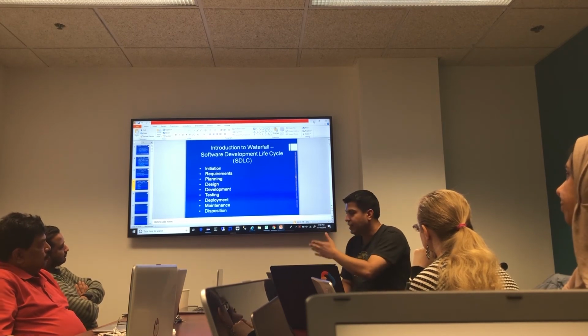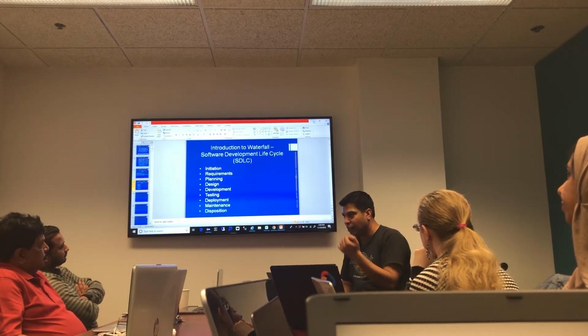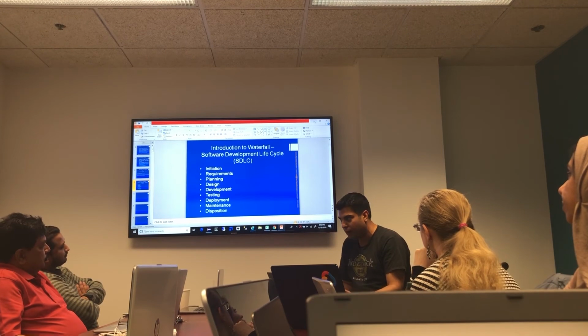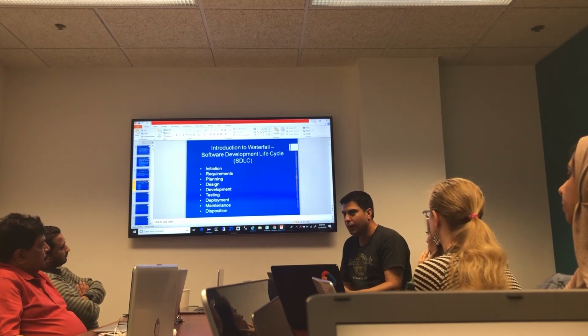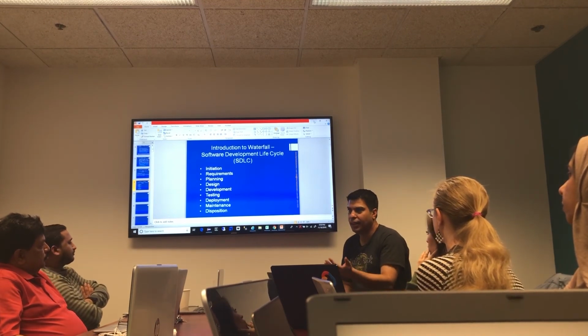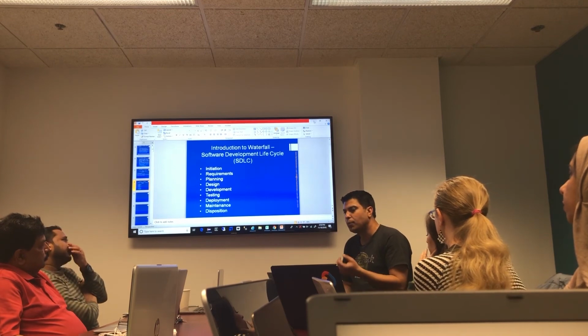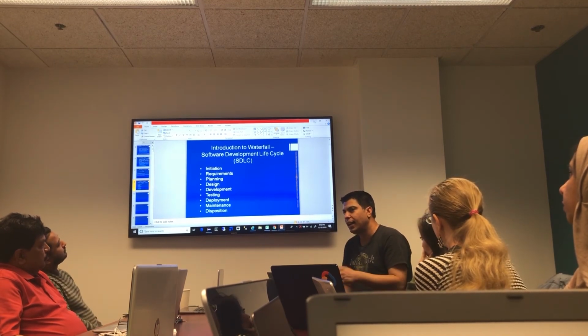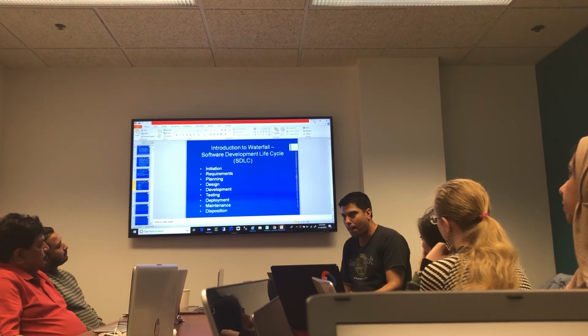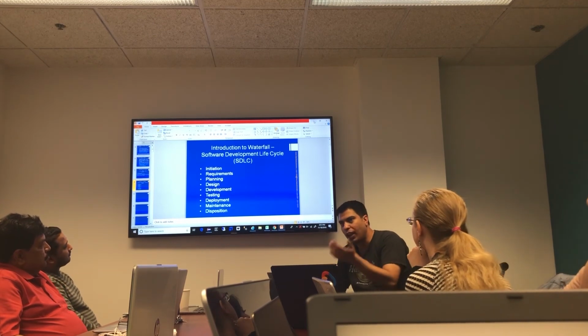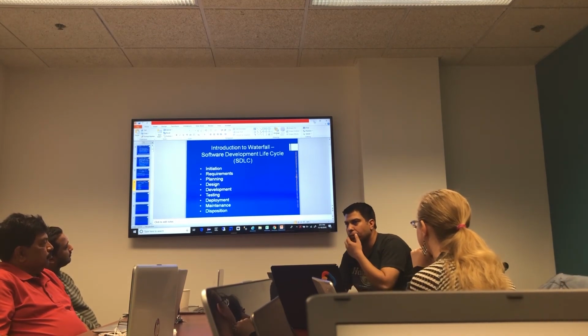So at what stage it is done, every team gets involved. They say this is the effort, this is the time, and it is sent back to the client, and the client decides. Initially, a smart business analyst usually tells the client, let's do it in release 2, if you can wait. If you cannot wait, this is the impact.